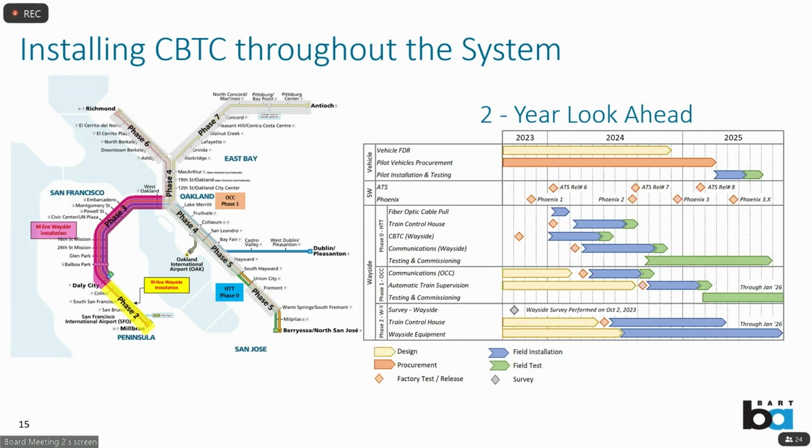I mentioned earlier about this phased approach. Everything is phased, including this captive fleet. Another option is resequencing a test track at Dublin to after the W line is nearly complete to keep the construction forces focused on the W line.